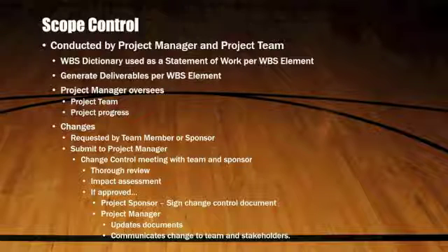The project manager will then either deny the change request if it does not comply with the intent of the project, or convene a change control meeting with the project team and sponsor to review it more thoroughly and perform an impact assessment. If the change request receives approval by the sponsor and the project manager, the sponsor will formally accept the change by signing the project change control document. The project manager will update all project documents and communicate the scope change to all project team members and stakeholders.